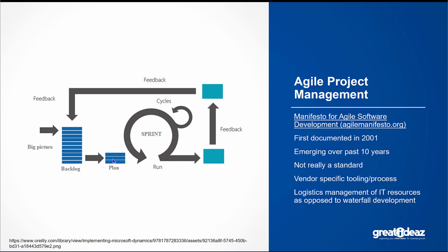So that team as a whole, a cross-functional team, would be looking at a set of things that needed to be built, and that build process would be decomposed into a set of sprints and cycles, or releases and iterations. So there is a large cycle where we're doing the detailed planning, and then there is a small cycle that's essentially working through on a day-to-day basis with the team, where the team are actually implementing things. And then the whole process goes through a feedback cycle where we're dropping more stuff on the backlog.